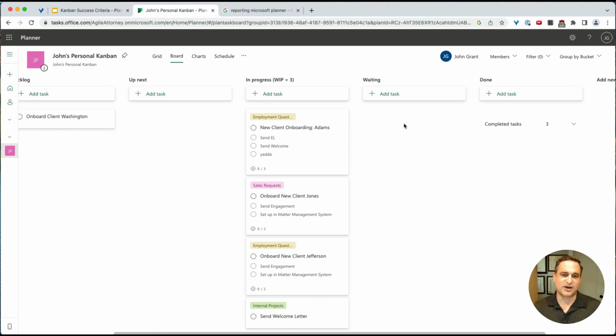It may be a little nuanced. What's the difference between waiting on something and a blocker? I usually think of them as being different things. When I have waiting, it's usually waiting on a third party, not usually waiting on an internal resource. Whereas blocked is something that is blocked by something within our control, right? So a blocker that is within my team.